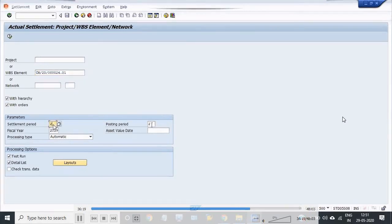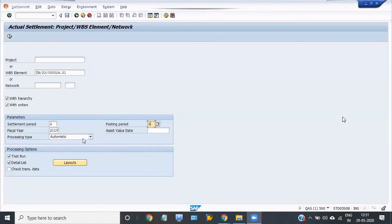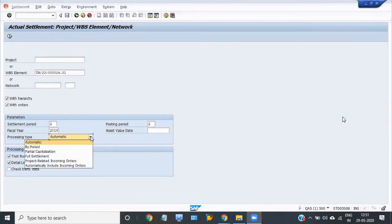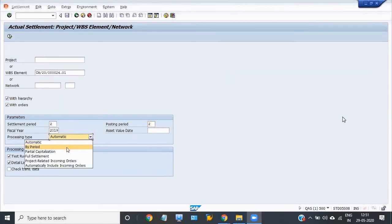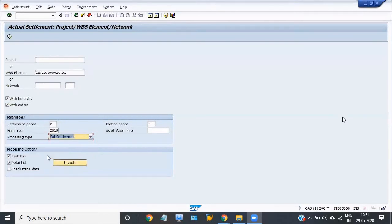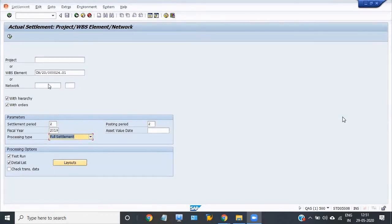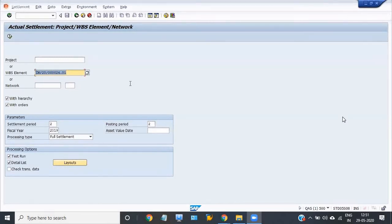The settlement period is month of May. Processing type is full settlement. In the previous transaction, we selected automatic, but now our processing type is full settlement. Test run detail list. You have to fill the WBS element and settlement period and points, and the settlement is full settlement.